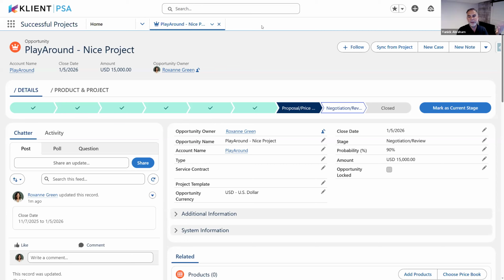The flow I built this morning, that took me 2 minutes to do that change. So I'll show you this in a second. And someone's asking if it only works if you have dependencies in your project or not. No, that's the beauty of this one. Transpose really transposes everything. It's going to reschedule, but as is, it's not going to recalculate everything. You might need to do other operations on top, but it's really a transpose. Perfect. Yeah, let's see what you built.